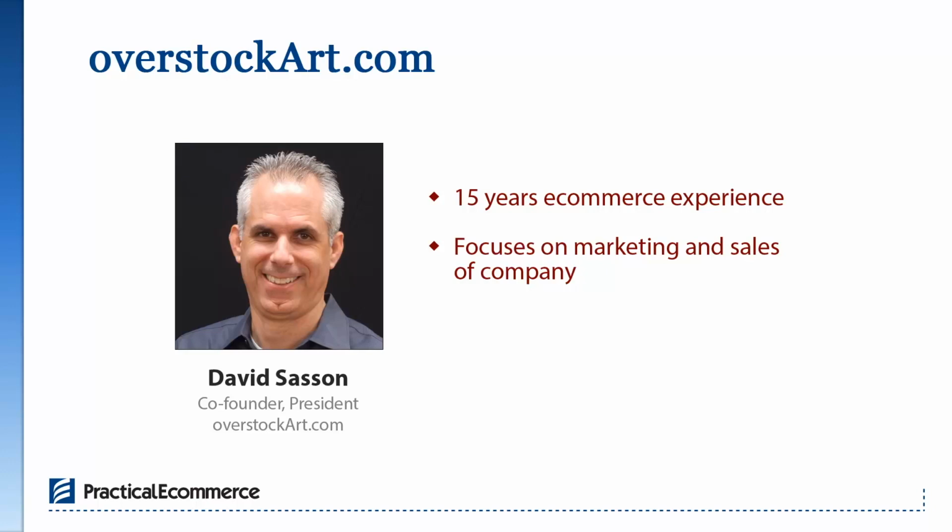Having an initial meeting where we both understand exactly what we're looking for, outside of the contracts and the agreements, which are necessary as well, just a discussion that we know what it is and we understand. And then there is setting expectations. So they're going to tell you that they can finish in, say, 3 months. That's what they told us. You have to know as a merchant that it's impossible to finish a re-platform in 3 months.